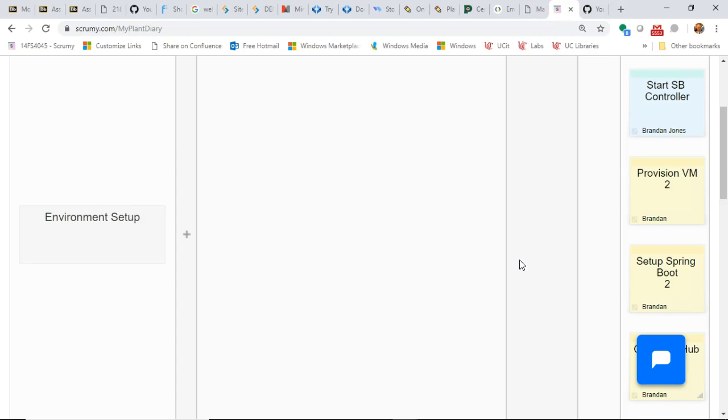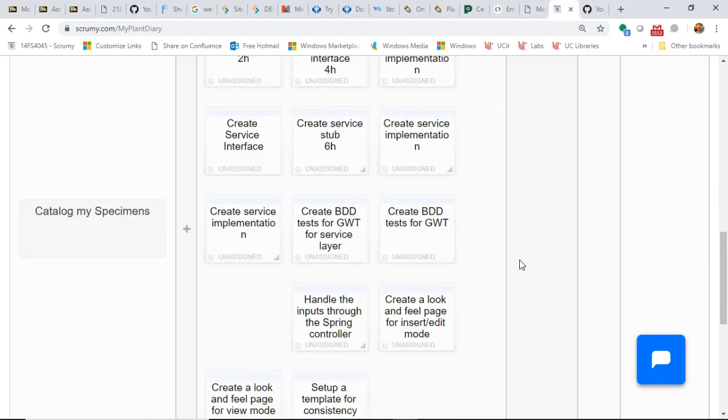So I strongly recommend that you task out the Scrum board with the sprint planning meeting, and then throughout the sprint in the stand-up, you just keep an eye on what's going on, and you can have an idea of if you're going to make your sprint goal or not. It's not that you're not going to make the goal that's important. It's knowing when you're not going to make the goal that's important. The earlier you can figure that out, the more time you have to plan.